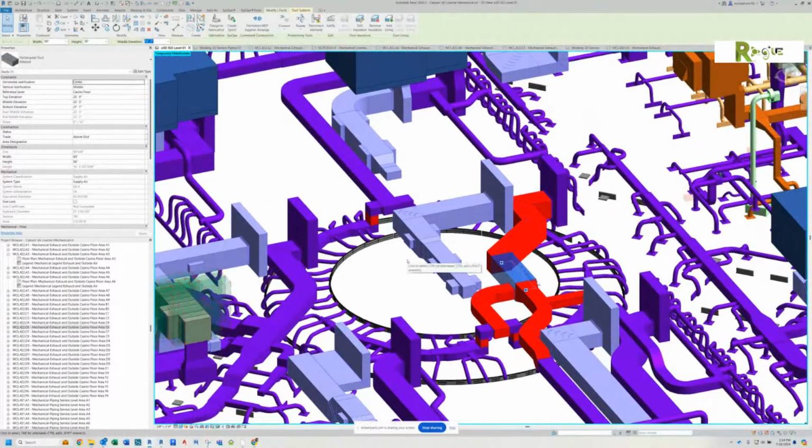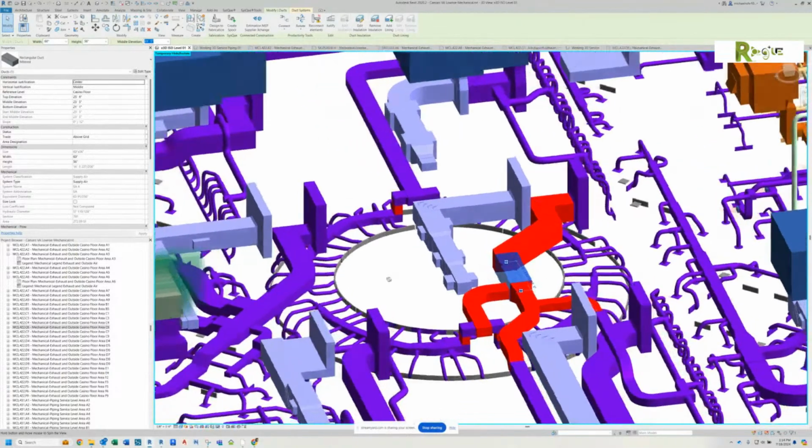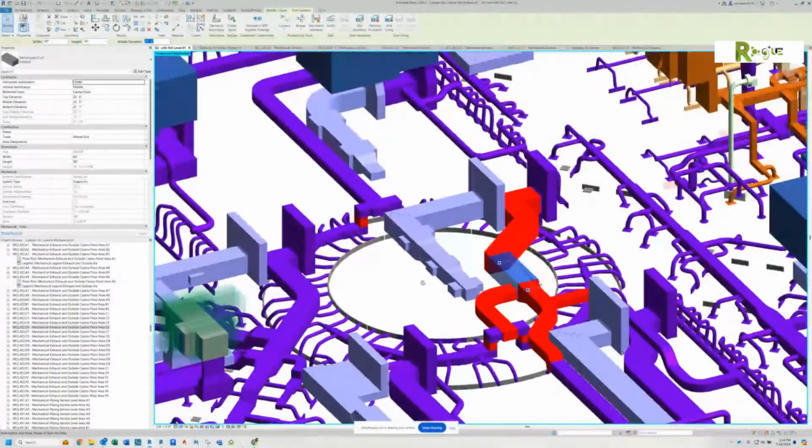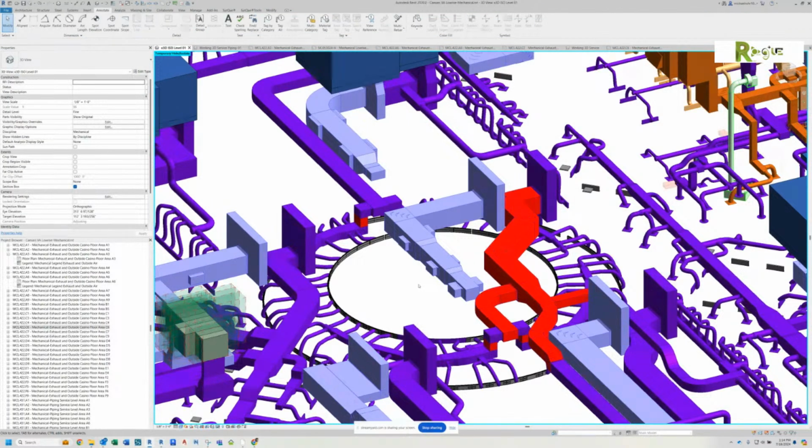So did I not read that email correctly? I thought they were going to fur out the side of that bulkhead to fit the diffusers in. Yes, but the ductwork you see in red, you've already hung, is above the secondary grid. When we raise that secondary grid, that stuff in red needs to get lifted, I believe, 8 inches. All right, so they're still raising the bulkhead then? They have to. You have to raise it in order to get that diffuser in there.